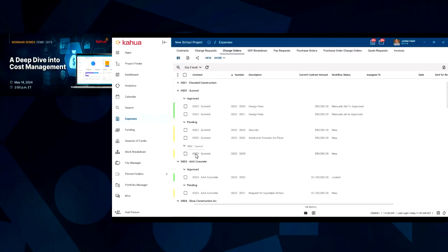Speaking of change orders, an interesting fact: we've built out of the box a special extra step in our change orders for board approval. We've seen this being a requirement for schools and cities, like for city council and others. Sometimes these change orders get to a certain point where they need to be held and wait for the board to approve, and we capture that process in here as well to streamline your communication as a project team to the appropriate project stakeholders.